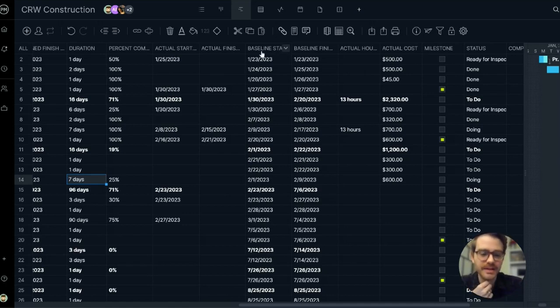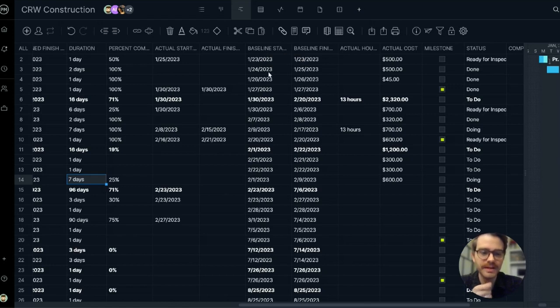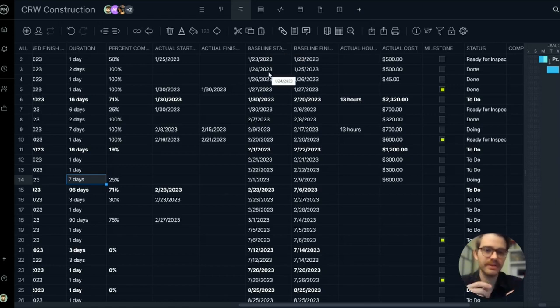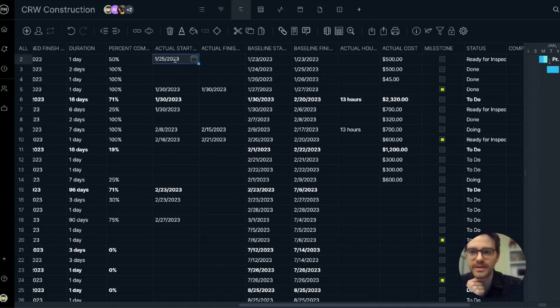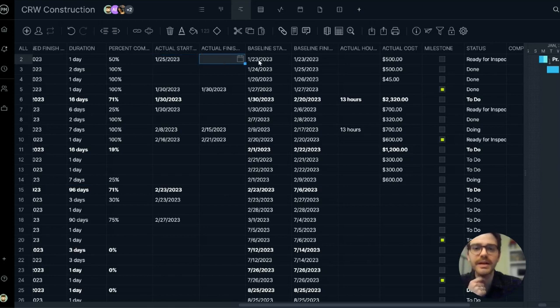And that's where the baseline columns come into play too. The baseline will freeze your planned dates. When you finish your plan, you activate baseline. Now I can quickly compare my actual date to my baseline. It looks like I started this task two days later than the baseline I had originally set.